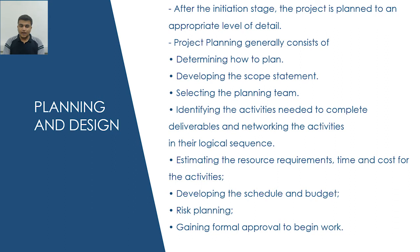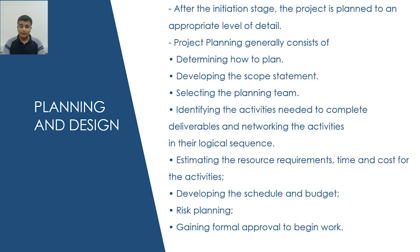Next is planning and design. After the initiation stage, the project is planned to an appropriate level of detail. Project planning generally consists of determining how to plan, developing the scope statement, selecting the planning team, identifying the activities needed to complete deliverables and networking the activities in a logical sequence, estimating the resource requirements, time and cost for the activities, developing the schedule and budget, and risk planning and gaining formal approval to begin work.